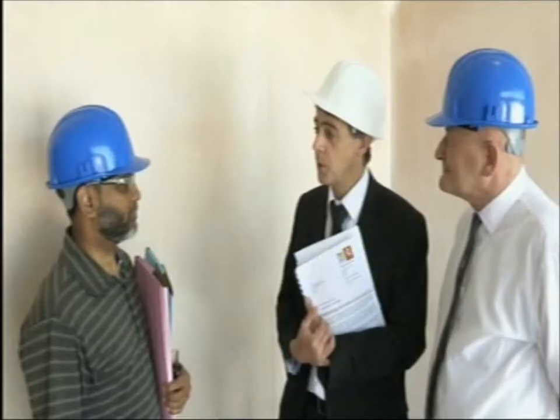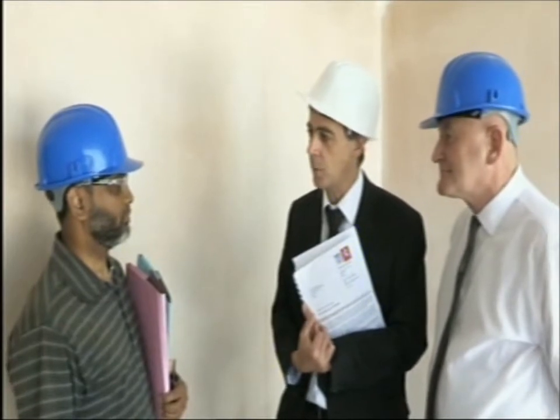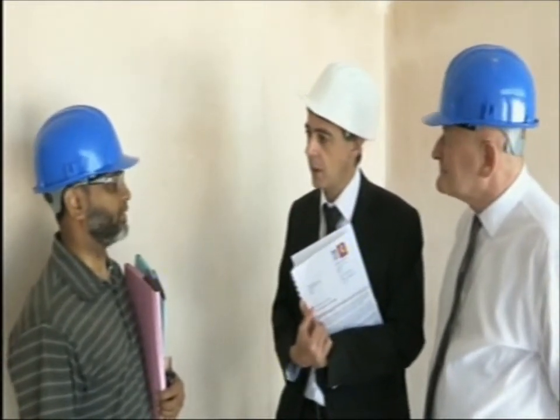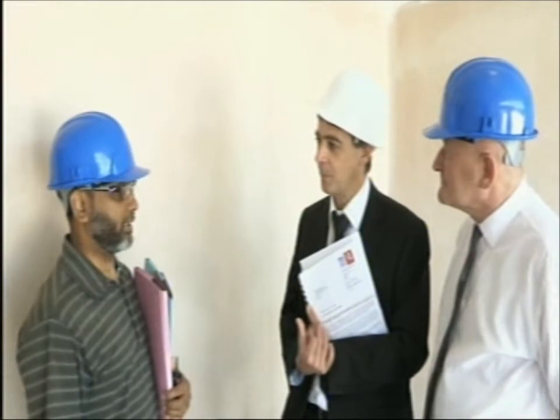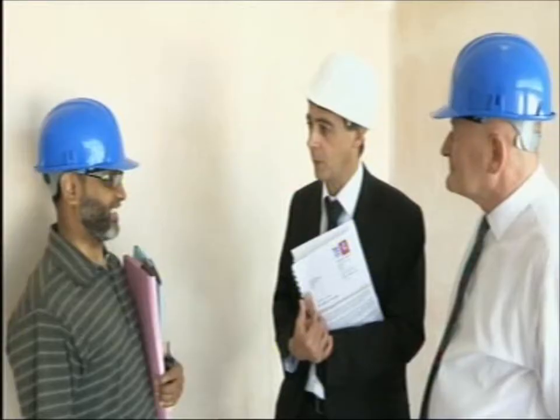Great. So, Mr. Islam, we've seen a lot of work being undertaken today. Is everything going to plan in terms of the project timescales? Yes, everything is going well, according to the plan. And in terms of the overall budget, how are things going with that? It's going well, yeah. We are nearly there. We are spending some from our own pocket, so we are waiting for the next lot. So you've already exhausted the first round of funding that we've given you. Yes.